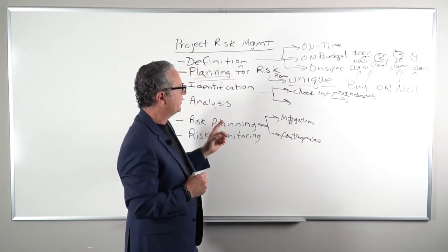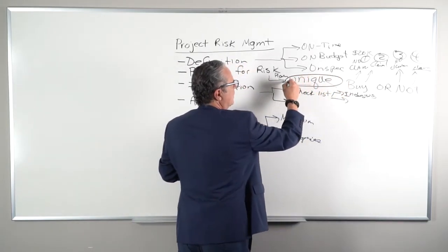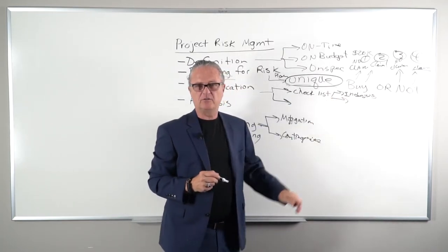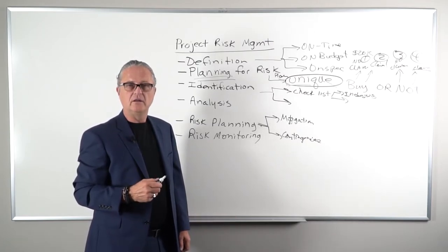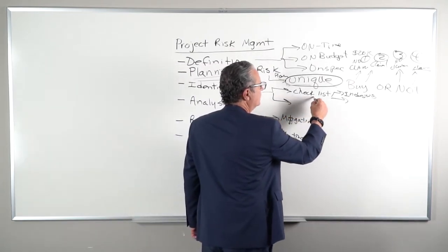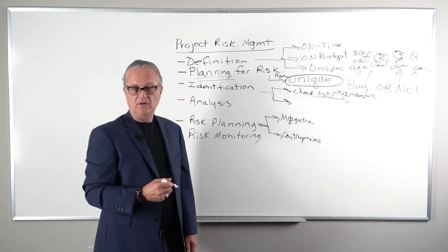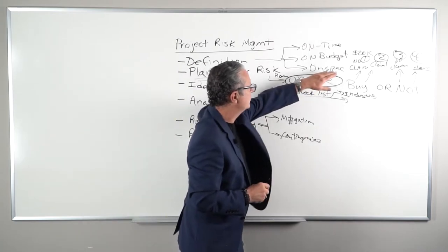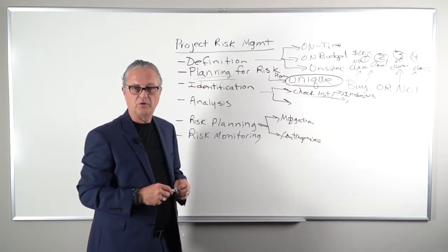So the other thing that happens is, because we're in this unique world, a question would be, is the checklist going to be comprehensive? And the answer is never. Right? If you're in a unique project, we think about, well, what else is there beyond the checklist? So how would we do that? Well, we go to the people who know the most, right? The people who are building the solution against the specification are the best people to tell us where there's risk.